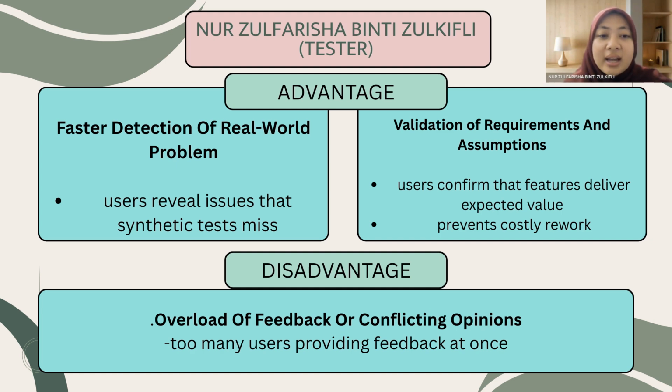As a tester, there are two benefits of involving users in release testing at an early stage and one disadvantage to user involvement during the project validation and verification stage. The first benefit is faster detection of real-world problems, where users reveal issues that synthetic tests miss, such as workflow gaps and usability friction. The second benefit is validation of requirements and assumptions. The user confirms that features deliver expected value and prevents costly rework by catching mismatches before wide development investment.